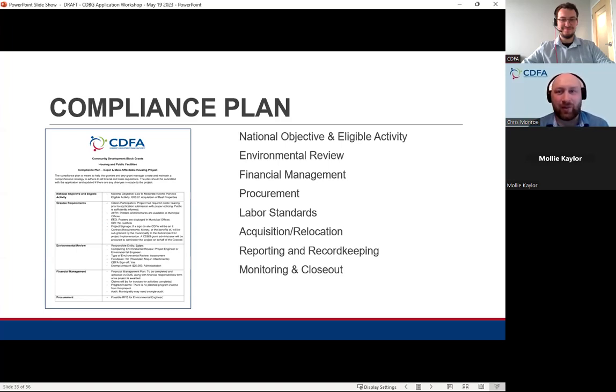As Molly mentioned, I'm here to talk about a few additional threshold requirements for your CDBG application, one being the compliance plan, which will be completed in collaboration with your grant writer and your project team. The compliance plan is a document that must be completed and uploaded with the application. The plan outlines how a grantee plans to address key compliance topics, which includes the national objective and eligible activity, as Molly talked about earlier, specific to your project, whether that's housing or public facility. Environmental review, which is a very critical component in your CDBG project.